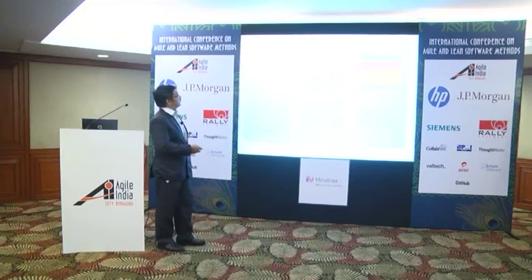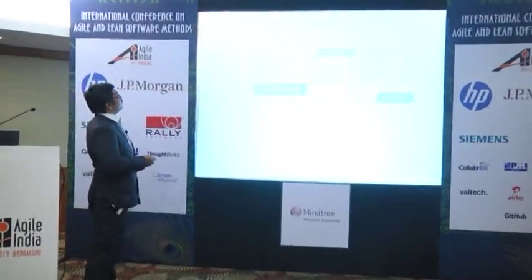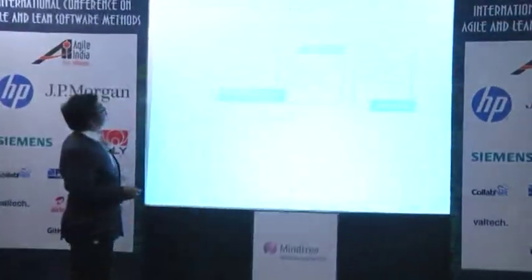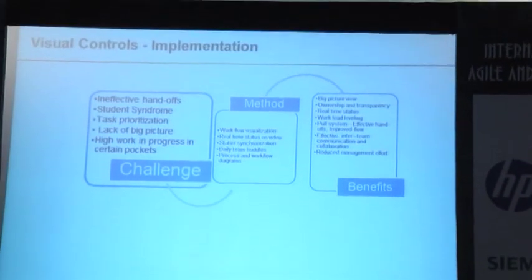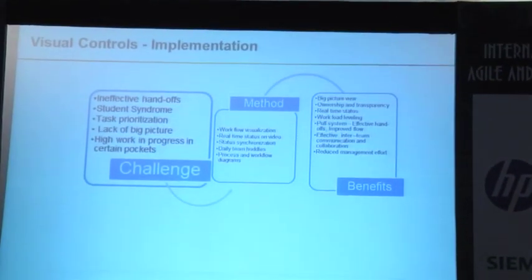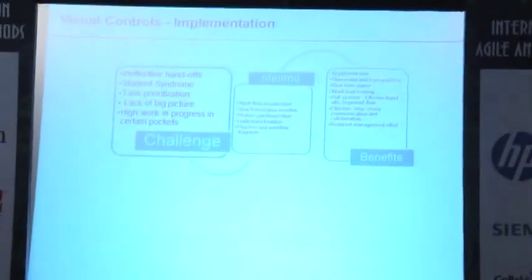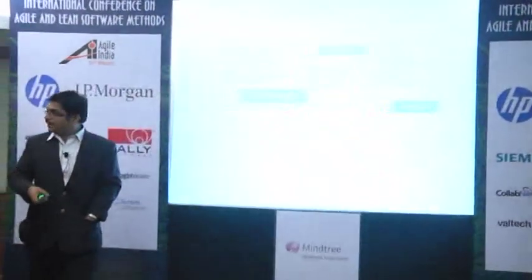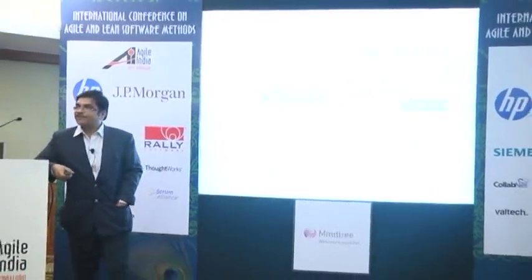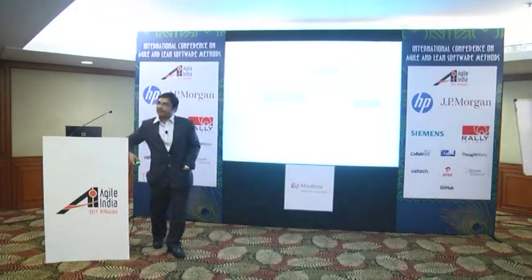I won't get into the details of what visual control is — we all know. Let me start with the challenges. One challenge we saw was student syndrome. We have all been students: even with 3 weeks of a study holiday, we would likely study only in the last few days. There is a tendency to procrastinate on things we know take less time than what is given.